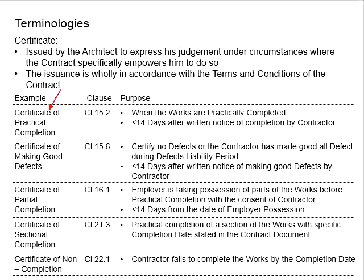First, the certificate of practical completion. This can be found in Clause 15.2 in the PEN contract. It is issued when the works are practically completed. The meaning of practical completion refers to the point at which a building project is completed. There could be minor defects which can easily be rectified without undue interference or disturbance to the occupant. In other words, practical completion means the completion of the project. Although minor defects are allowed, these defects should not be significant and can easily be rectified.